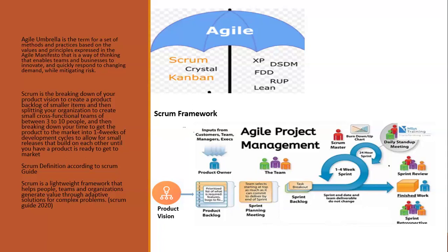Then there's what they call product backlog grooming. Of course, it happens also in this place, right? So what is product backlog grooming? During this stage, it's done by the product owner, sometimes with the help of the development team, whereby they further break down the product backlog items into more refined pieces that can fit for development to be able to deliver in that sprint.